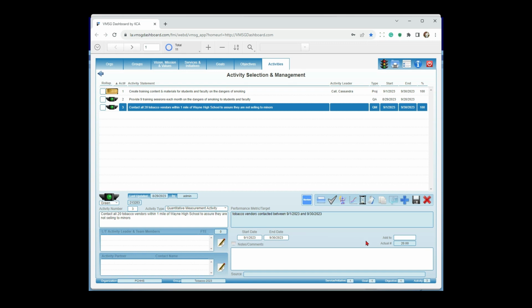They can just go in here and say, we did 21 plumbing inspections this month, and it's going to keep track of it all the way through. So if I put in 5 more here, it's going to sum it up to 25. Again, it's not able to calculate a percent complete in there. So those are the 3 types of activities, and all the different variations of the activity.